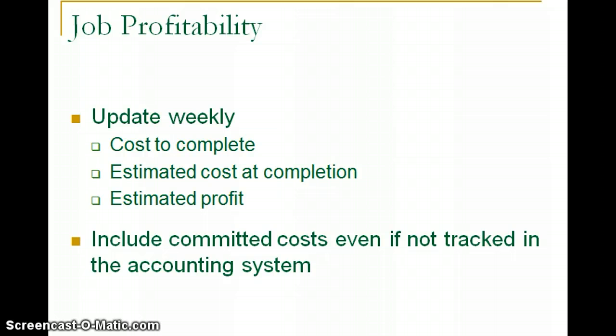It is important to keep track of the profit on a job-by-job basis. Again, that falls under the responsibility of the project manager. The project manager will require weekly updates of job cost reports so that he or she can compare what was estimated or what was in the budget versus what is actually being spent on a weekly basis.